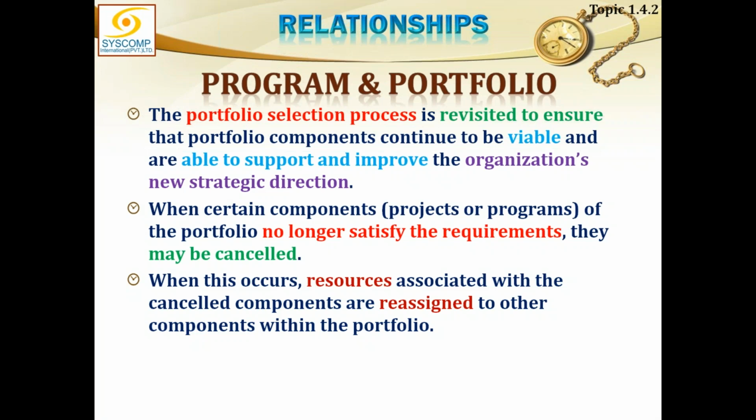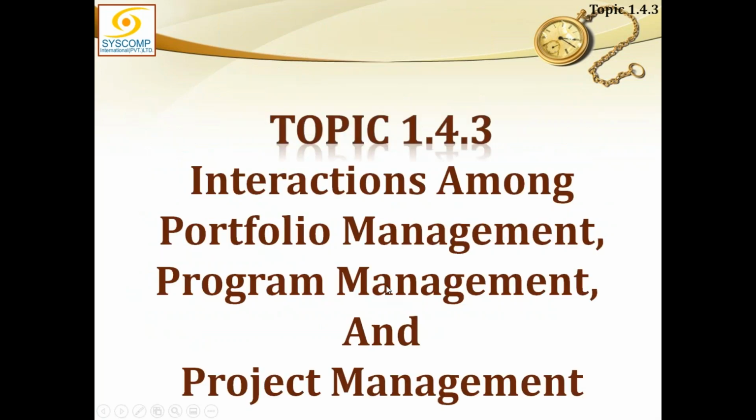That would be looking from the perspective of alignment with the organizational strategy. When certain component projects or programs of the portfolio no longer satisfy the requirement, they may be cancelled. When this occurs, resources associated with the cancelled components are reassigned to other components within the portfolio.